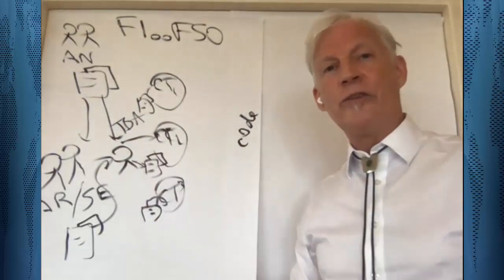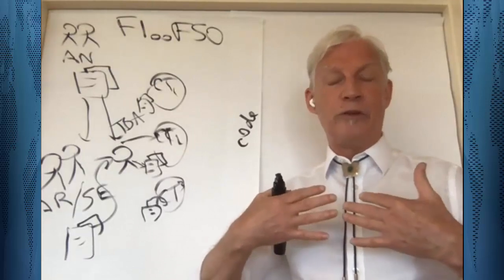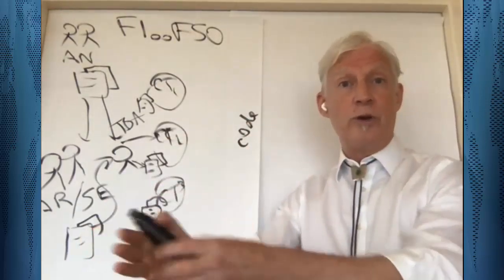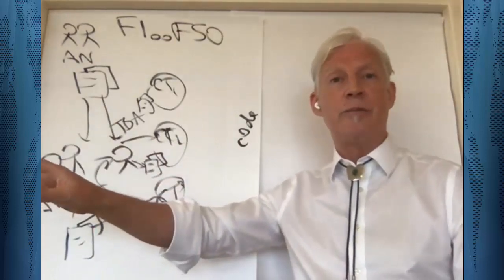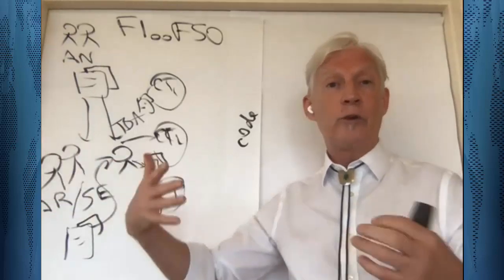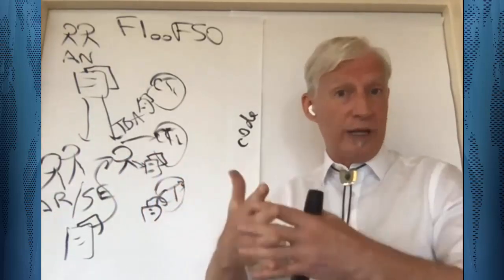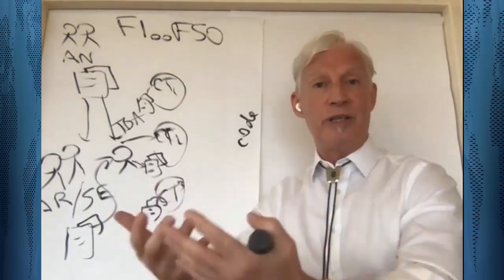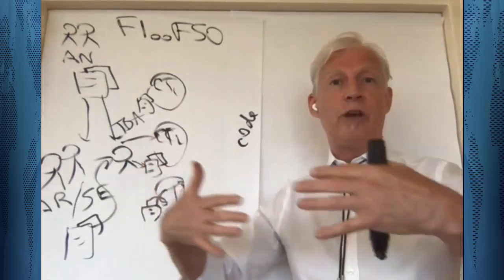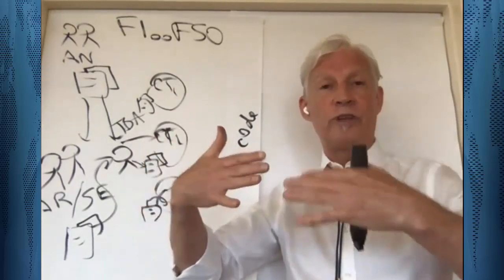Well, what are the implications of that? The implications are that when, for example, if I'm in component team 1 and I make a call to code that's in component 2, that's the responsibility of another team, the handler for that call might not be there. And as a consequence, the code won't actually integrate, it won't link and integrate, and can't actually execute altogether, because you've got these unintegratable parts, because not all of the code that works together is being created in lockstep.